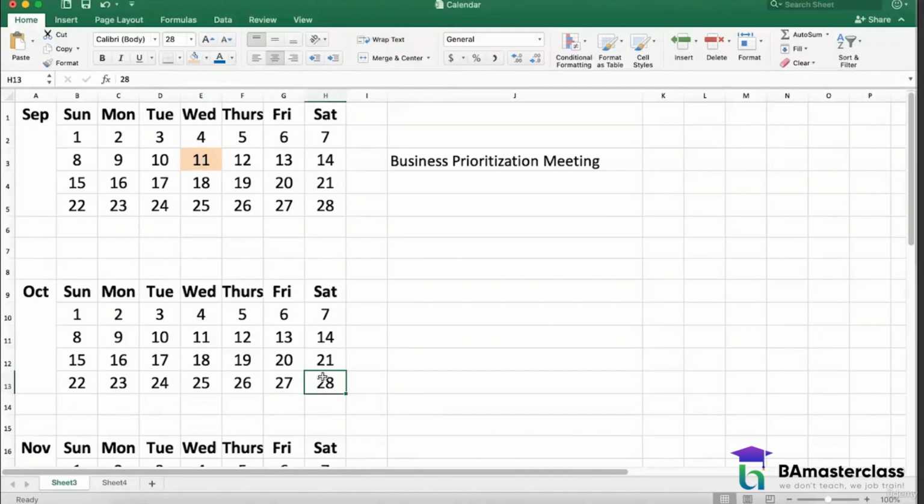So I want to work a month ahead of the time. When would I have identified the priorities of my September 28 release? I would have identified that on August 11th, a month earlier. So every time that I meet in the middle of the month, I want to ask them, tell me what you want to be delivered on the next month's release. So for the September 28th release, I would have identified the same on August 11th. I hope this helps understand.